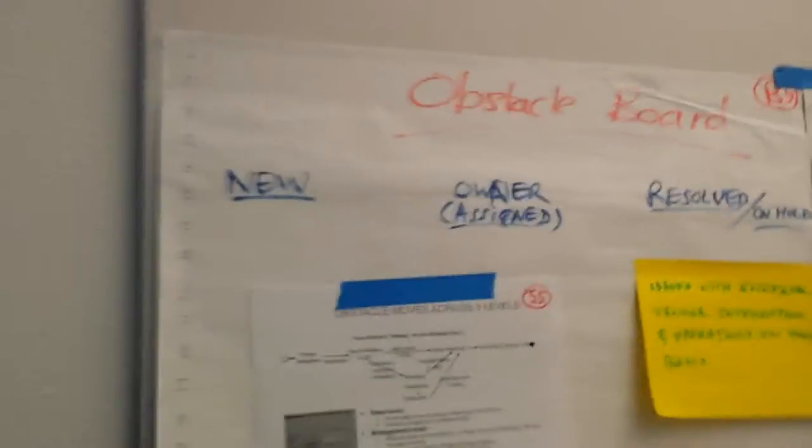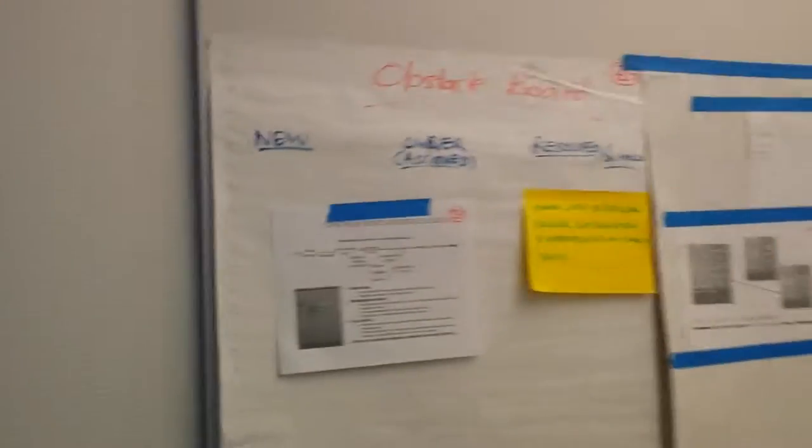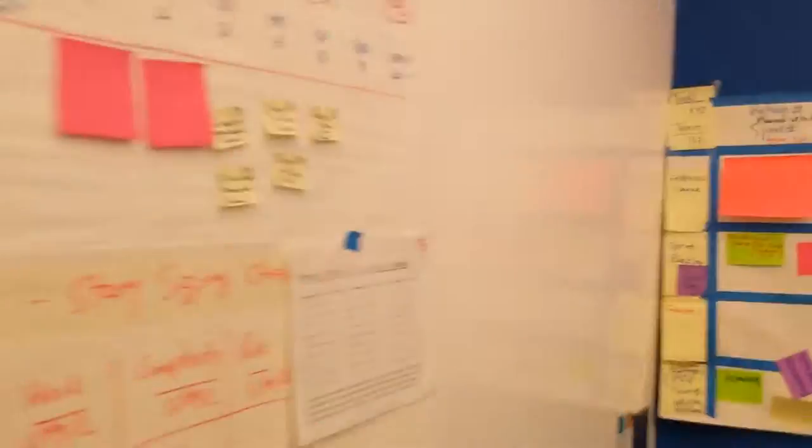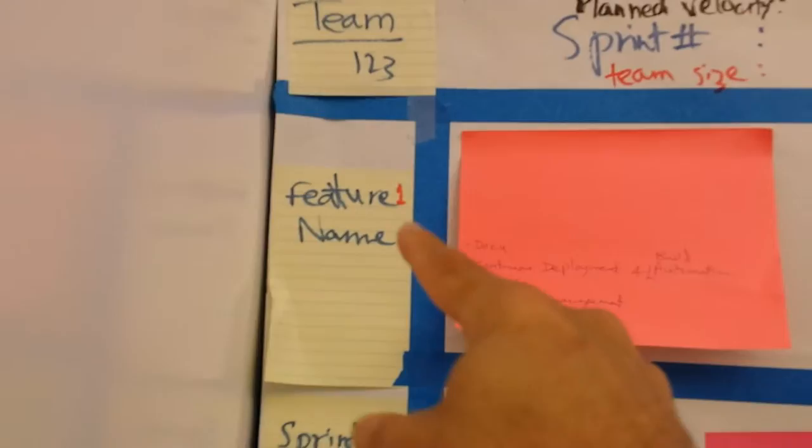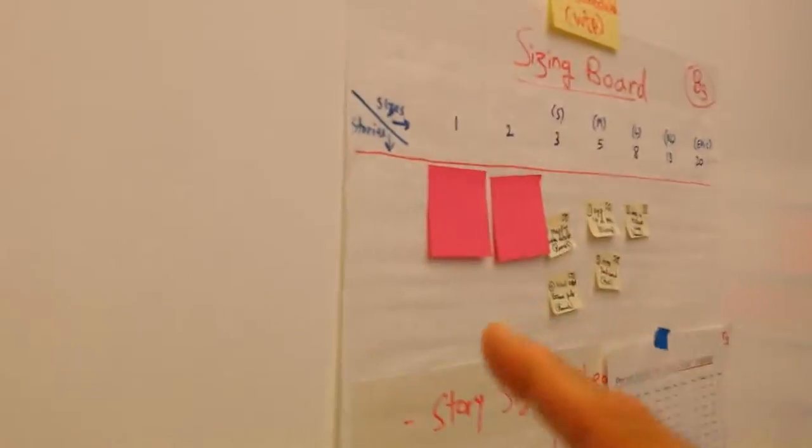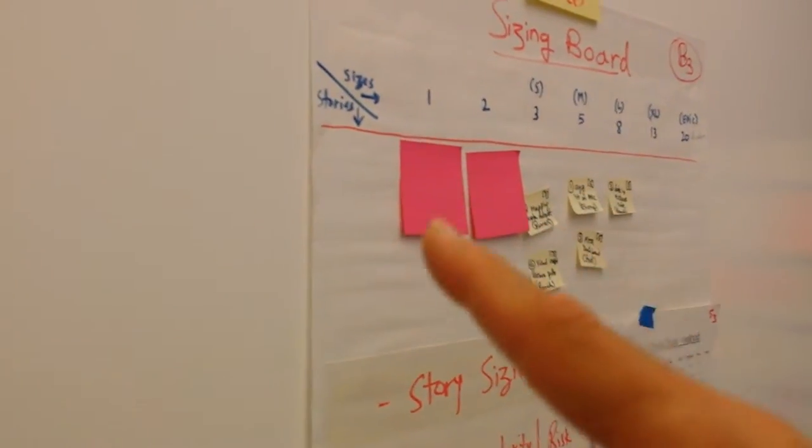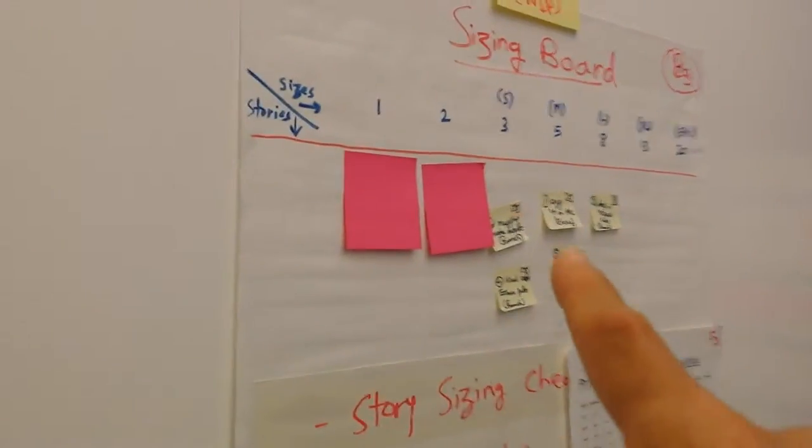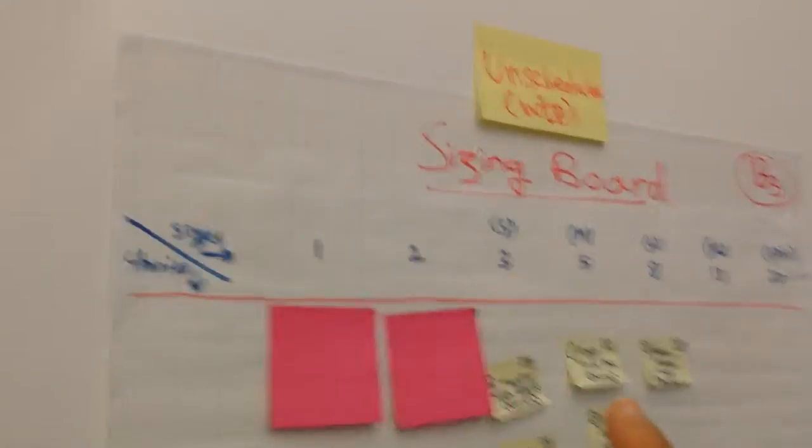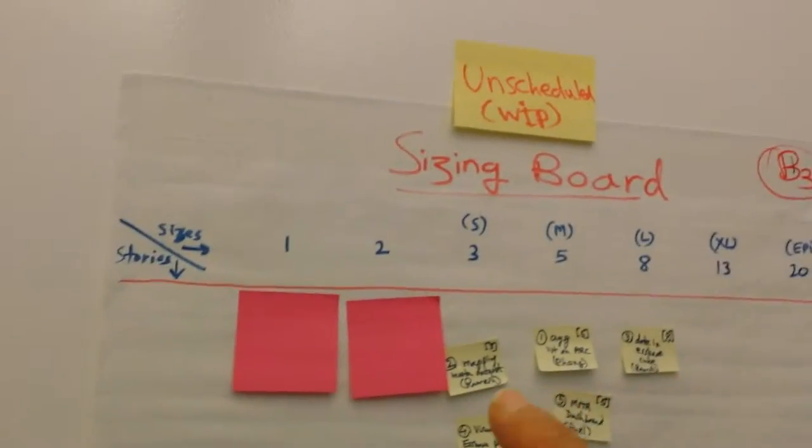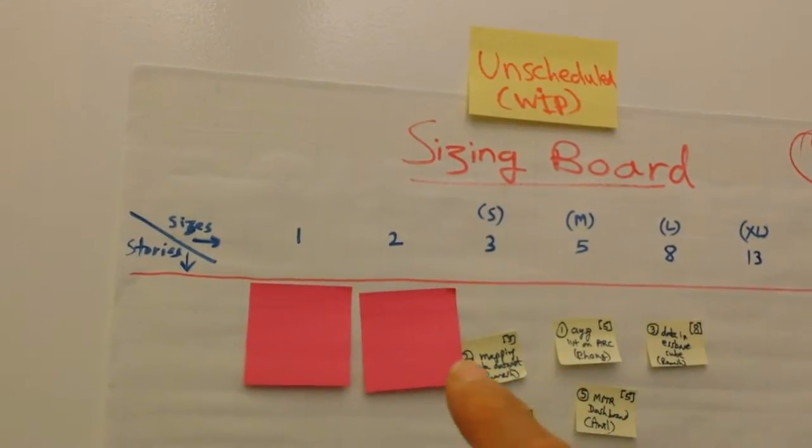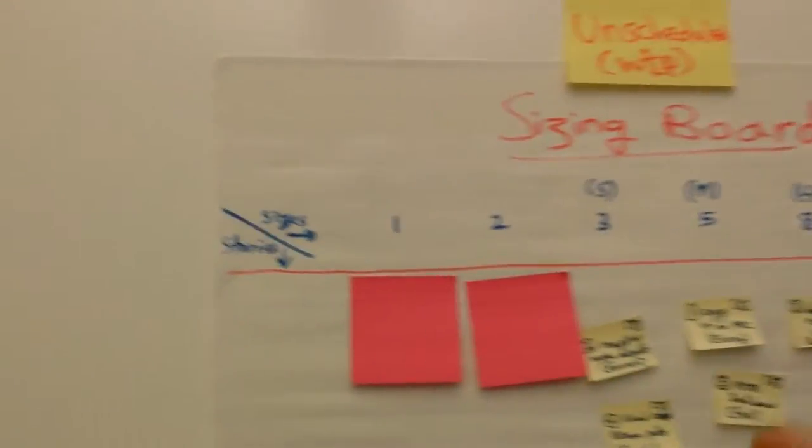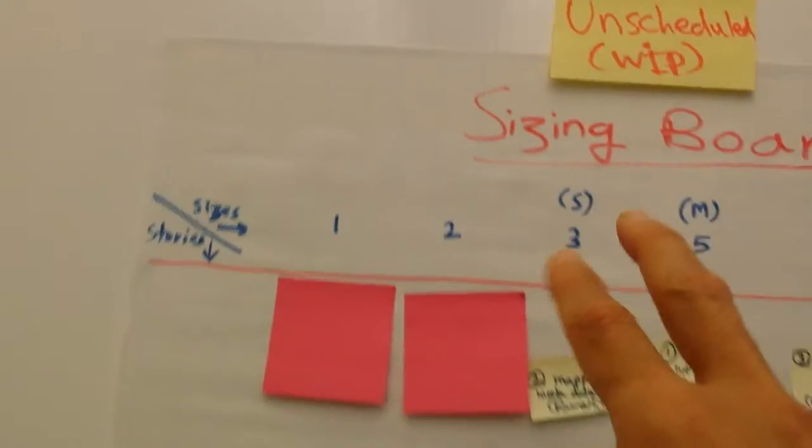We also have a board that we'll come back to in a minute. The first thing that happens in this room is the product owner describes a feature—feature number one—and then the team starts decomposing that feature into stories. The stories are now part of what we call the unscheduled area.